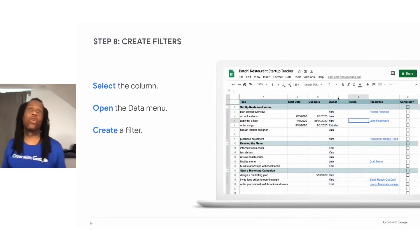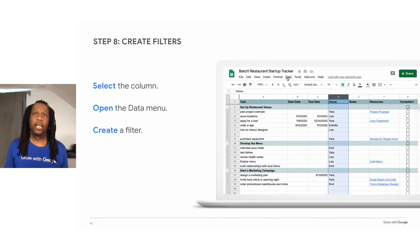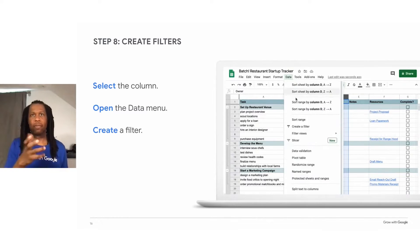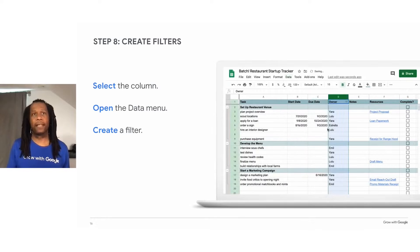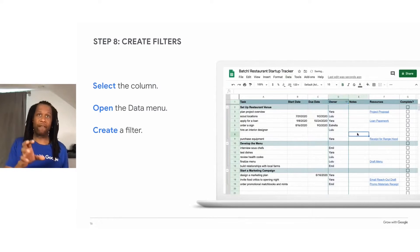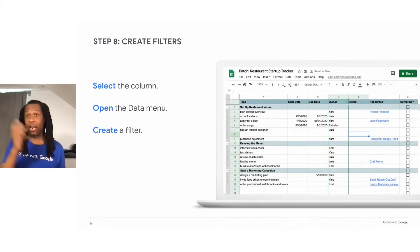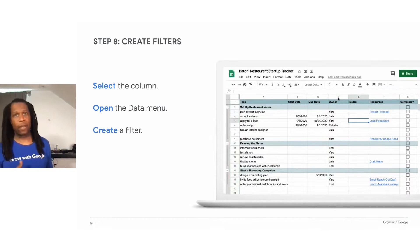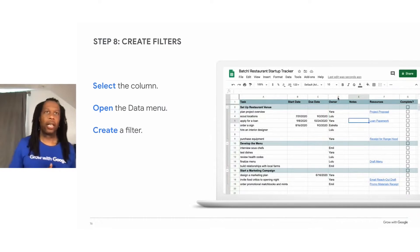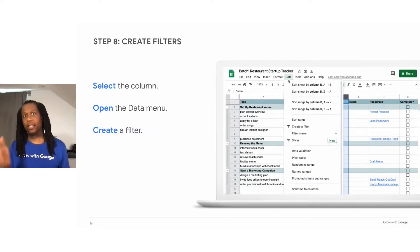A filter is a tool that you can use to simplify your spreadsheet and view just the information you want to see. For example, you can actually add a filter to see only the tasks that belong to a team member, not all the team members in alphabetical order. To do this, you would select the data menu and then create a filter.